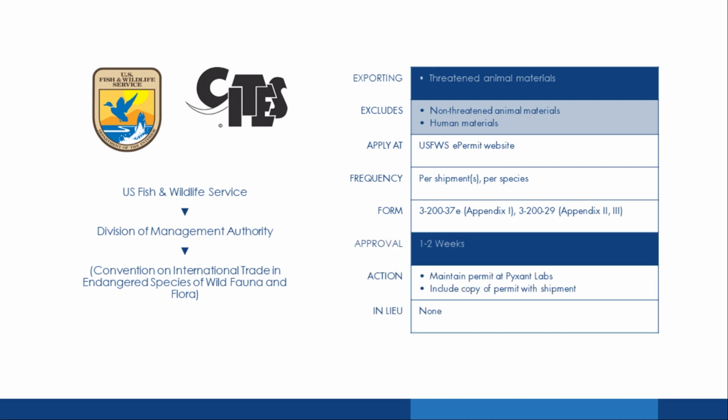So this permit can take 1 to 2 weeks to obtain conservatively. And we maintain a copy here at Pixent Labs, and then we also include a copy of the permit with the shipment that we send out.